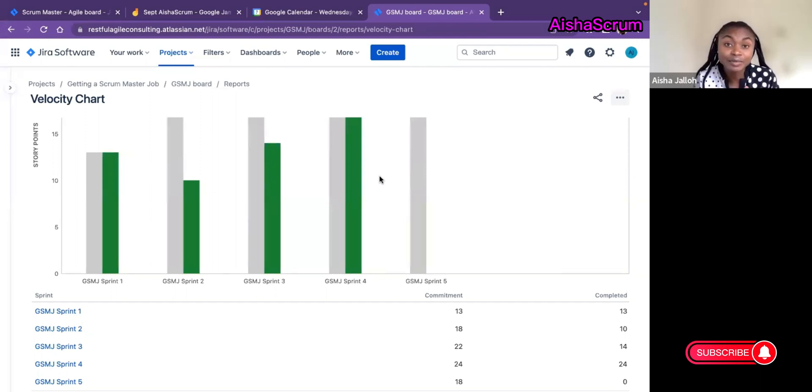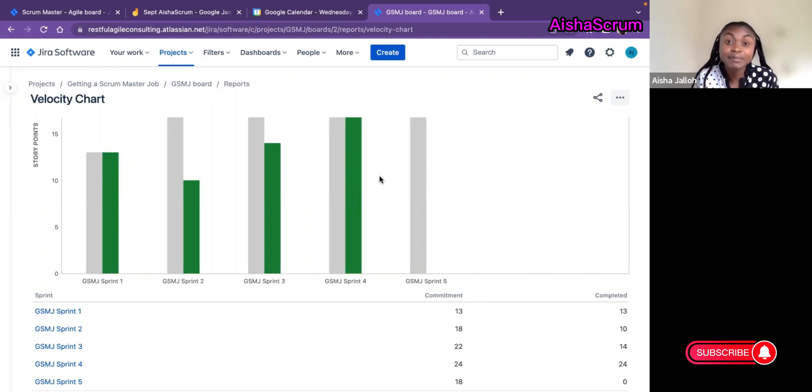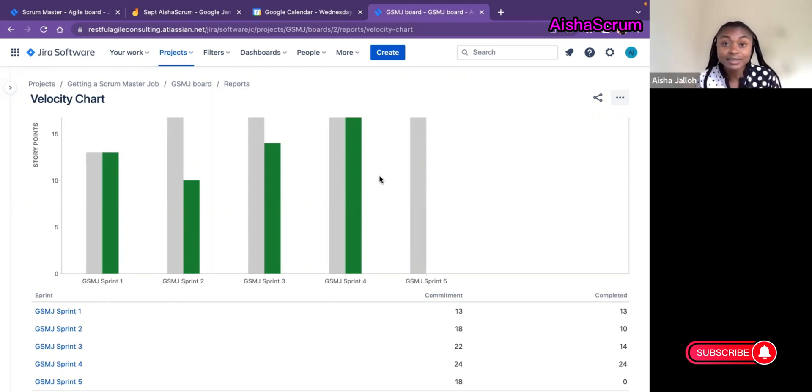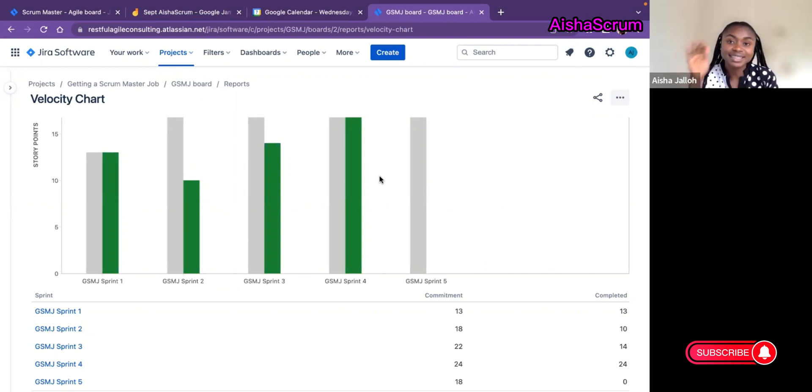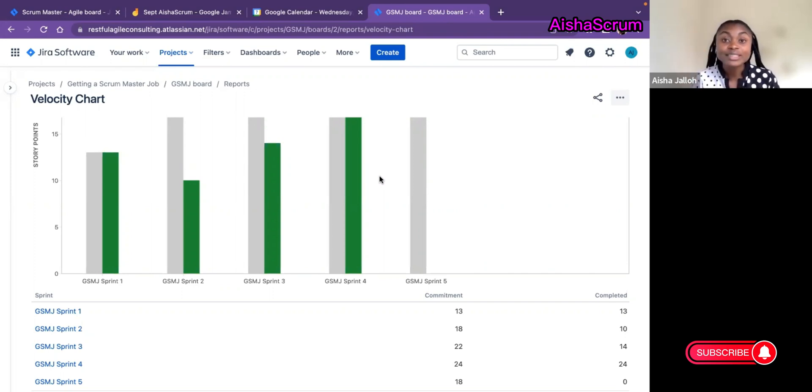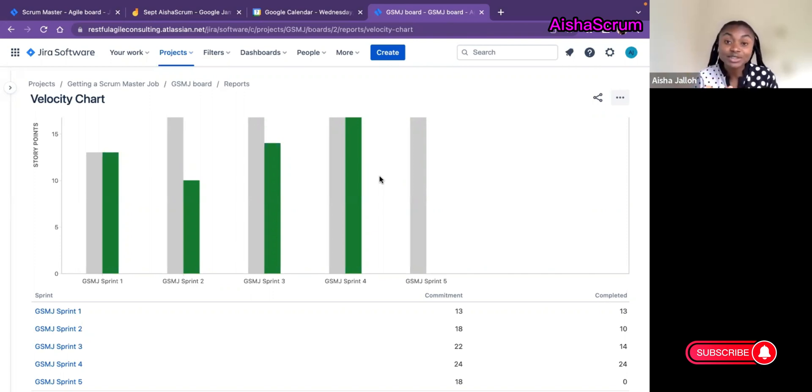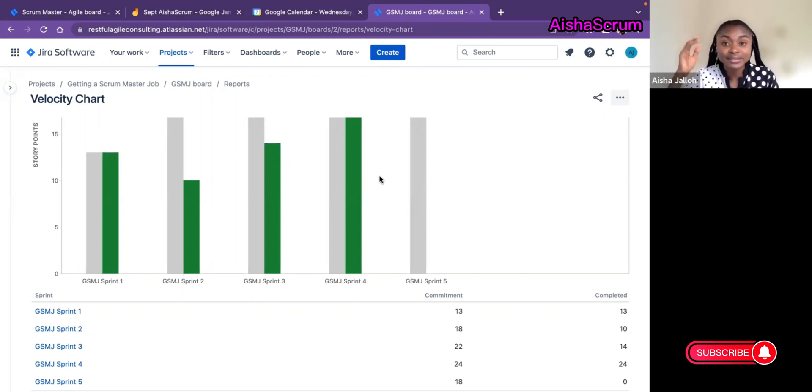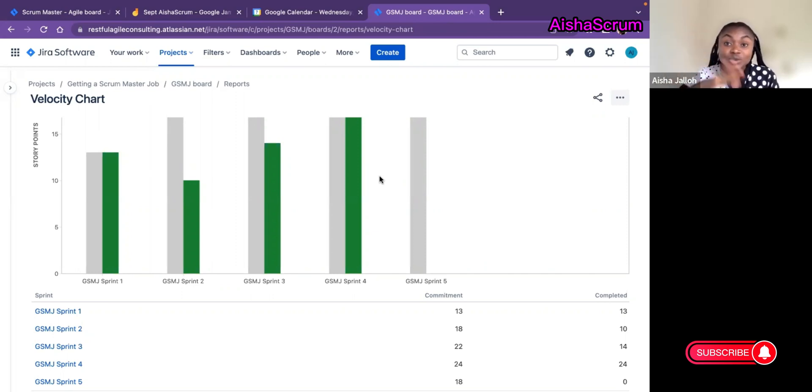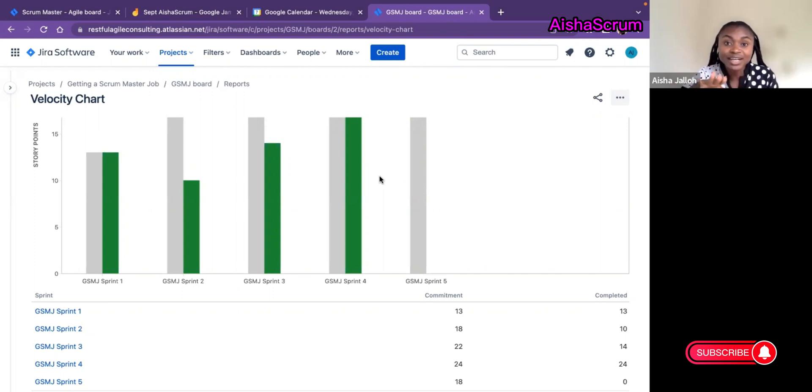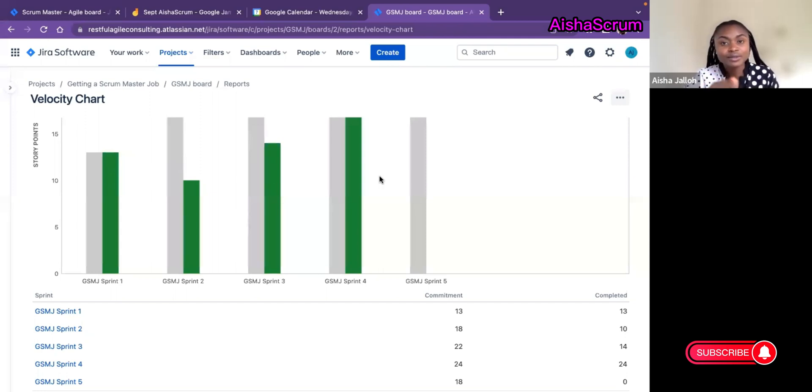For a new team, eventually you will see in the beginning the velocity might be low because the team are not used to working together, they are not used to the environment. Later on you now notice that the team velocity is increasing. They already went through the Tuckman model of team formation and went through all the stages, and now they are in a position where their velocity will continue to increase, then eventually get to a plateau state where they now have their balance in their performing stage, where they'll know that on average we'll always roughly complete 30 or 35 story points.